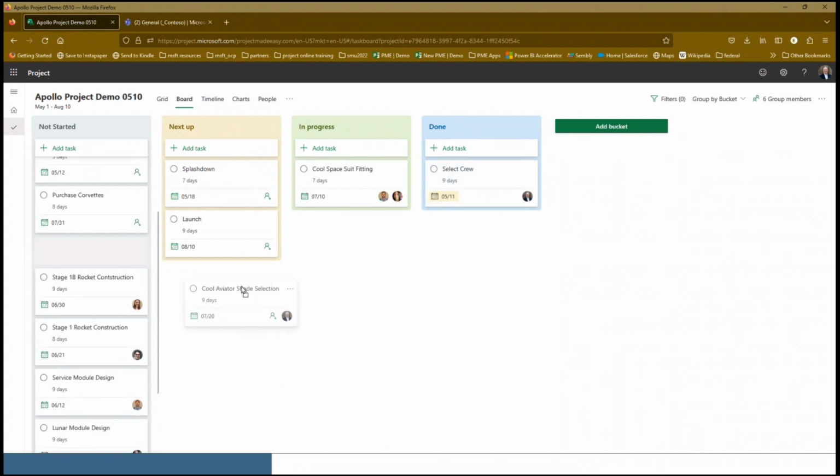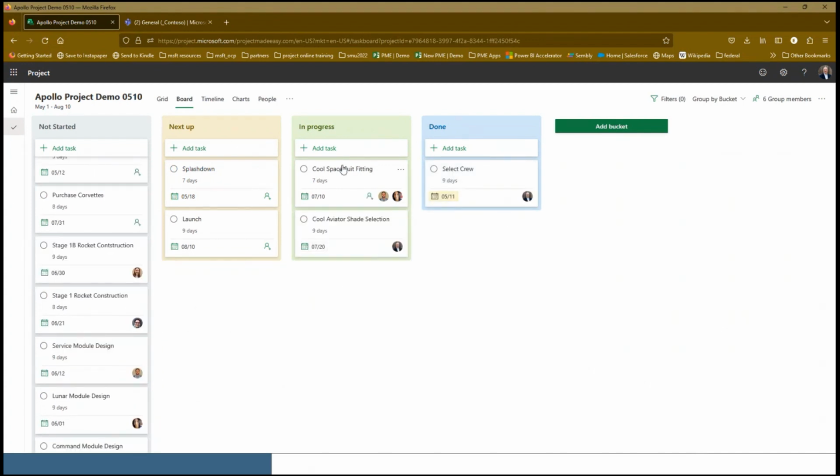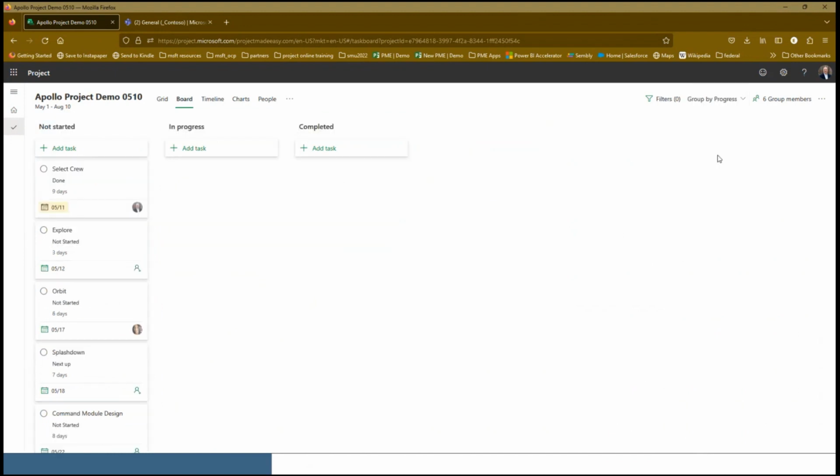I believe that's what we're in progress on. I can also go to another filter over here to the right that is called in progress. It's just going to be not started, in progress, complete. And so you could say, well, I've completed that. Immediately it goes to 100%. In this view, it iterates by 50%.